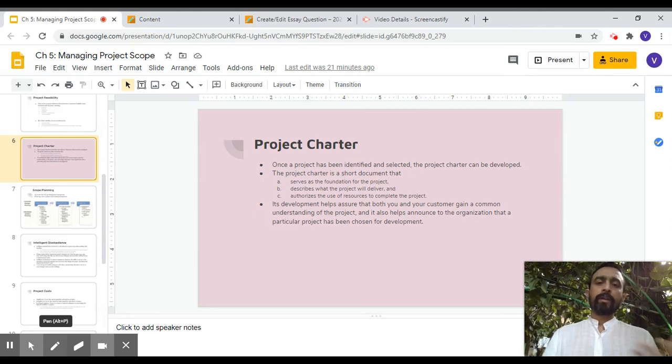Okay, another example of a requirement would be, currently our website has an old event calendar. We need a calendar on our website that'll pull the information directly from my desktop calendar, so the events will automatically update on the website calendar as well. So that would be an example of a requirement. All right, so let's see if you can get more specific with your requirements and put this into a project charter.